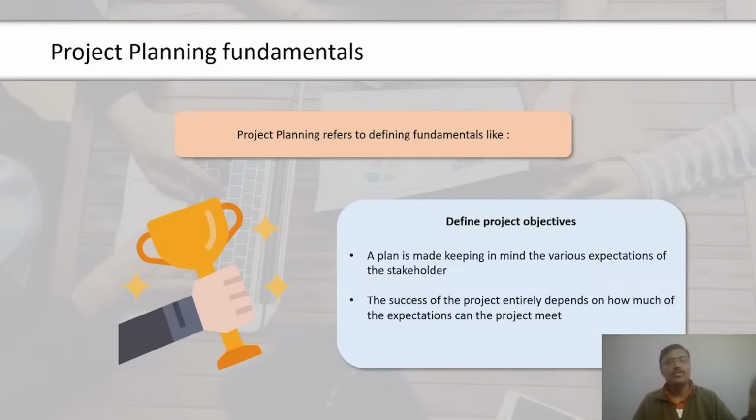Cost management plan is the primary output of this process. It establishes the units of measure, levels of precision, organizational process links, control accounts to be used, rules for performance measurement and reporting, frequency and methodology of monitoring the cost, and various other details that lay the overall framework for cost management on a project. In the next screen, let's discuss the second process under project cost management.